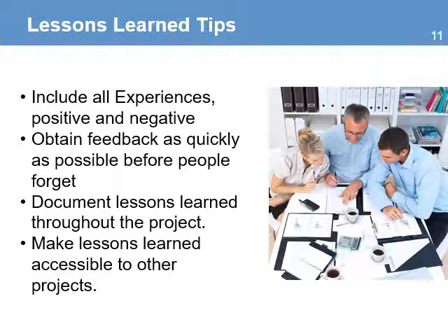Document the lessons learned throughout the project. Don't just wait until the end of the project to have the session. It is good practice to conduct brief lessons learned sessions at specific milestones. Lessons learned at the end of the project will only help future projects, but smaller lessons learned sessions during the life of the project will help the project while it is still running.